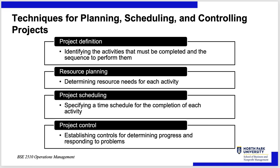Here are some techniques. Project definition means identifying the activities that must be completed. This assumes the project charter we talked about last time is done. Some books never talk about charters; some spend a lot of time on them. A charter tells you up front what you're going to do — and more importantly, what you're not going to do — the measurements of success, and how much money and time is initially allocated. We'll look at project definition assuming a charter is done.